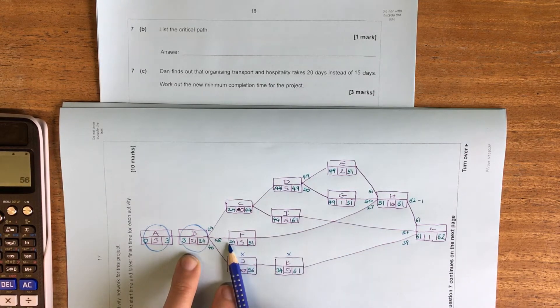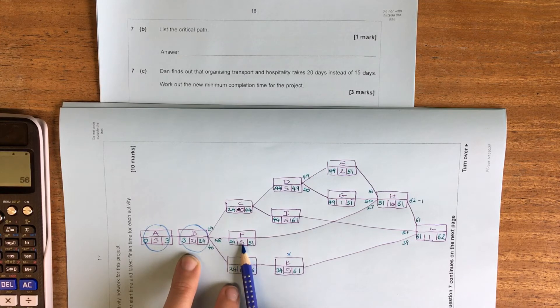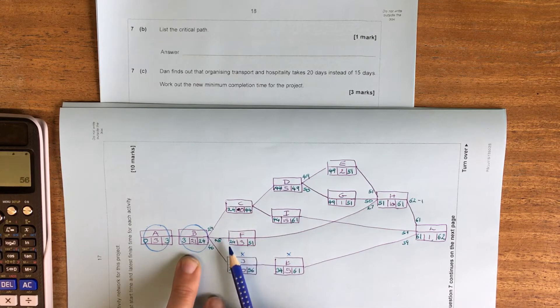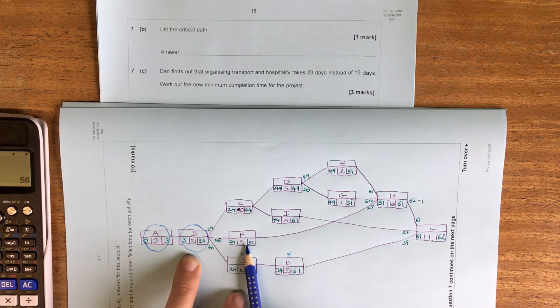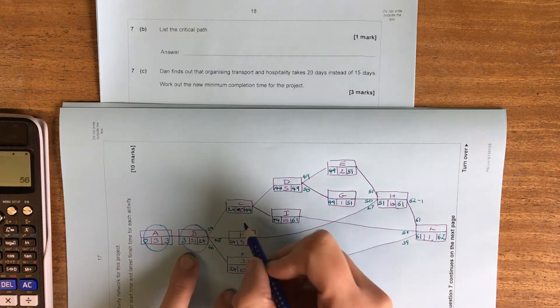So F can start at 24, takes 3, needs to be finished by 51. So this could be finished by 27. So this one's not critical.